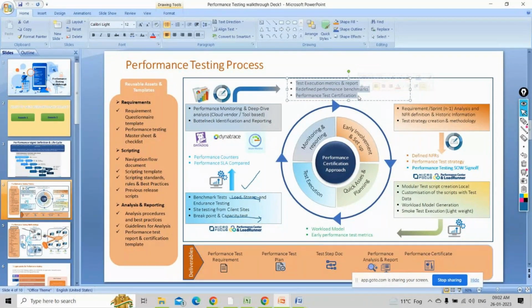When you gather the stats, obviously you'll get to know that they have done some kind of deployment. The version is not the version that you have certified, it was not tested properly, and that's why you're having all these performance issues. So when you're certifying, you have to share all the hardware level configuration, the software level configuration, and the software versions as part of your certificate, saying that with this hardware and software configuration, if the load is up to 30 users, the application will meet all these KPIs. So this is what I mean when I talk about the deliverables.